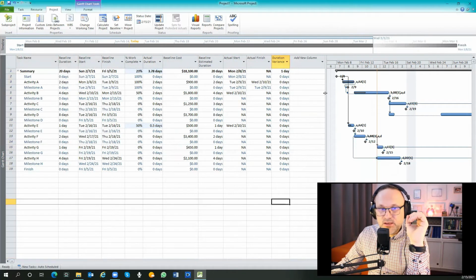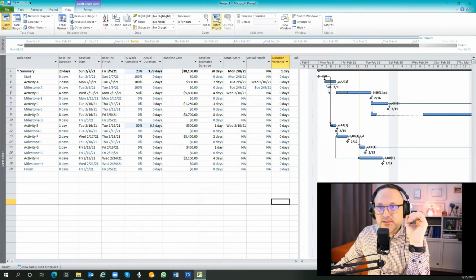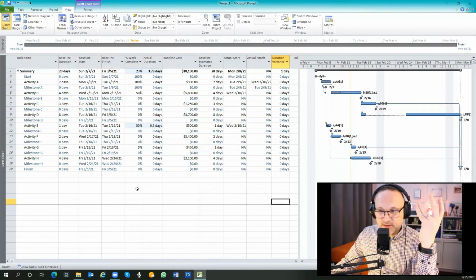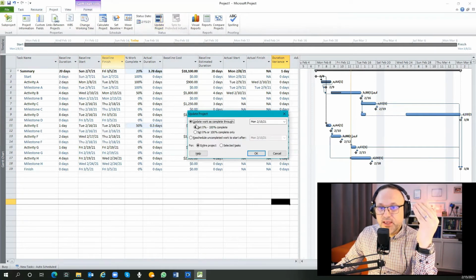so we can see more in one place. Okay, now we set the baseline, we set the current date, we put the actual percentage, and now we need to update the project overall. Okay, let's go to project, and we said project, update project. Okay, update work as completed as of today, set 0 to 30%, set 0 or 100%. Okay, normally you set 0 to 100%.